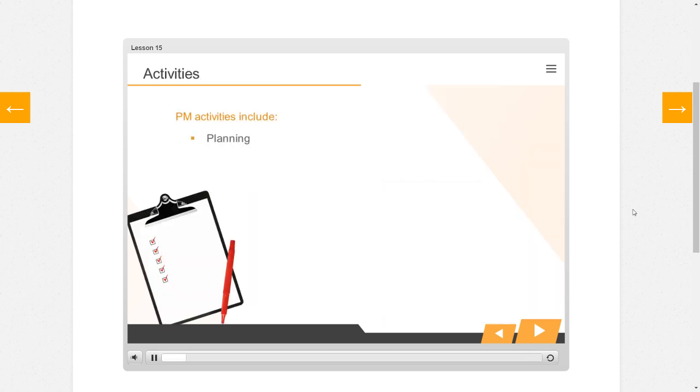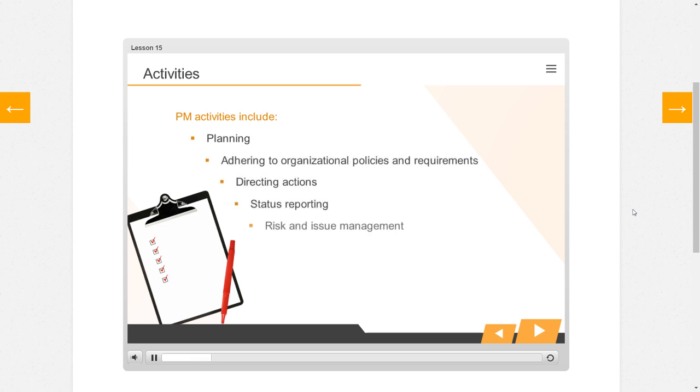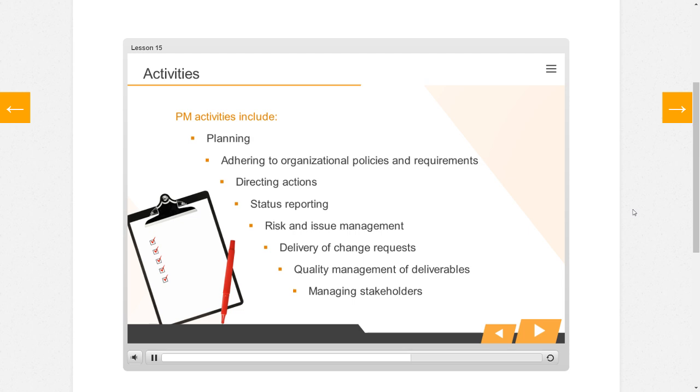You can see the project management activities here. Most projects start with a business case. A business case explains a proposed course of action, the benefits it will deliver, and its associated costs. This would be reviewed and approved before the project started. It would include the expected business value or business outcome that the project will deliver. Throughout a project, activities including status reporting, risk management, and quality management help to make sure everything is progressing as expected. For an agile project, each iteration needs a level of review and management. For a waterfall project, these activities follow the sequential project tasks.